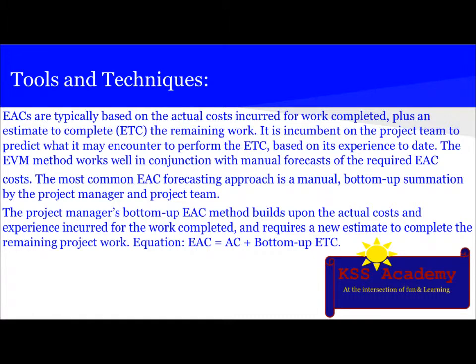The EACs are typically based on the actual cost incurred for the work completed plus an estimate to complete, that is also known as ETC, the remaining work. It is incumbent on the project team to predict what it may encounter to perform the ETC based on its experience to date. The EVM method works well in conjunction with the manual forecast of the required EAC cost.